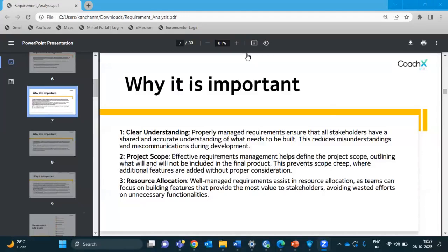If it is a very high priority request, you might want to do it, having everything aligned, like the budget, because the budget is decided on what functionalities you would be making, and what all resources you would be including. If it is easy and the client is ready to spend on additional resources, and the client says, I am okay to wait maybe 15 days more, but I can't live without this functionality, then please go ahead and do it. So there should be mutual consensus of both parties.